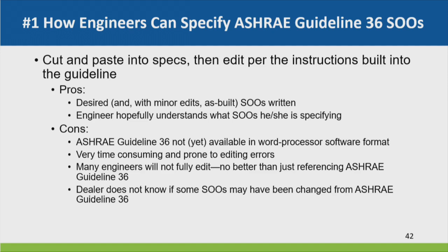And then most engineers are going to do what they do with their master specs, which is they publish the whole master spec and don't even edit it, right? How many people, if you've ever been a contractor, you see that, right? You get a pump spec and it has 25 different kinds of pumps and there's only 1 pump on the job, because they were too lazy to edit the spec. Well, they'll do that with the sequences too. Just publish the whole friggin' thing.